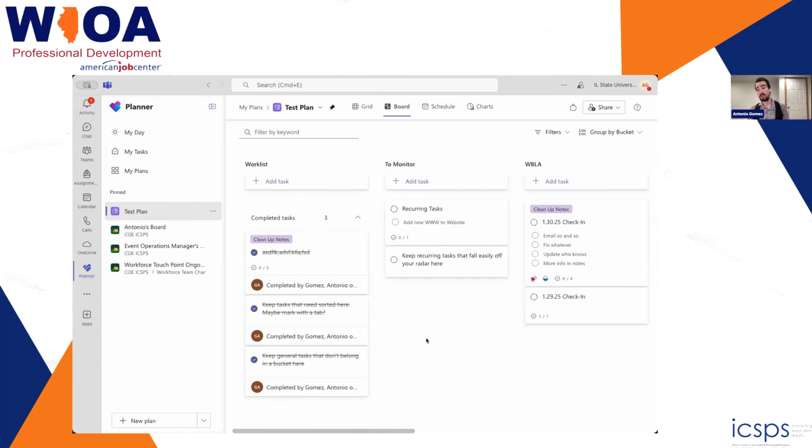Oh, yes. So an anonymous attendee has put in a note that says, if you want to assign staff, you need to make sure that you set up a checklist for each item to mark as completed. Otherwise, when one person marks it as completed, the entire task is marked as completed. Yes, yes. Couldn't agree more.